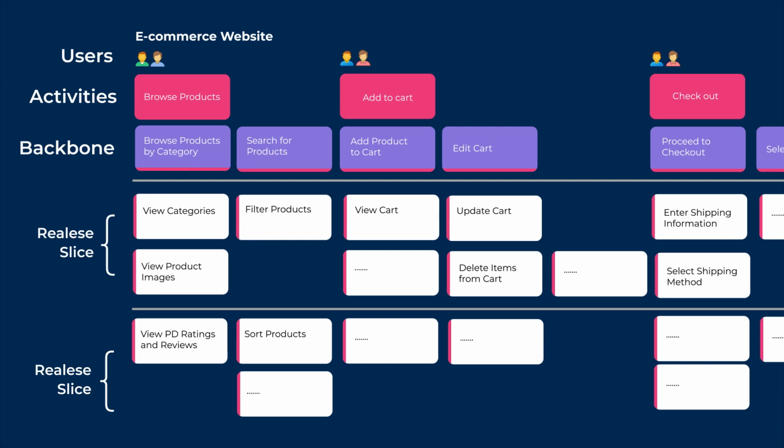This is the release slice. Use a tape line to identify slices of tasks that a user might use your software for to reach their goals. The smallest number of tasks that allow your specific target users to reach their goal compose a viable product release. Use release slices to identify small experiments, minimum viable product releases, or a working skeleton version of your product. Identify the target outcomes of your slice on a sticky note or card to the left of the slice. In Jira, this is a sprint.